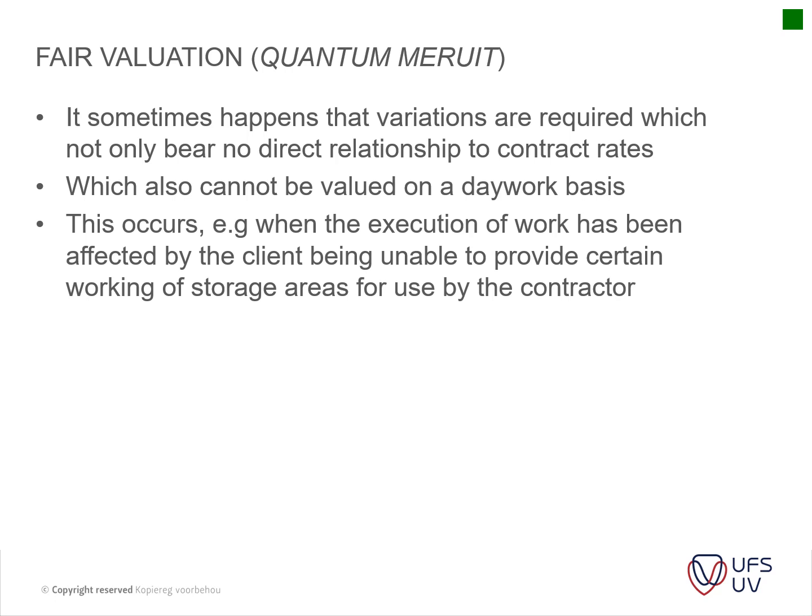For instance, if certain circumstances arise on site, now the contractor has to incur additional cost to secure the site. It was said in the tender briefing that the site would be secured, and now the contractor arrives on site and sees that there is no security on site. Now he has to get a security guard, he has to fence off the site, etc.